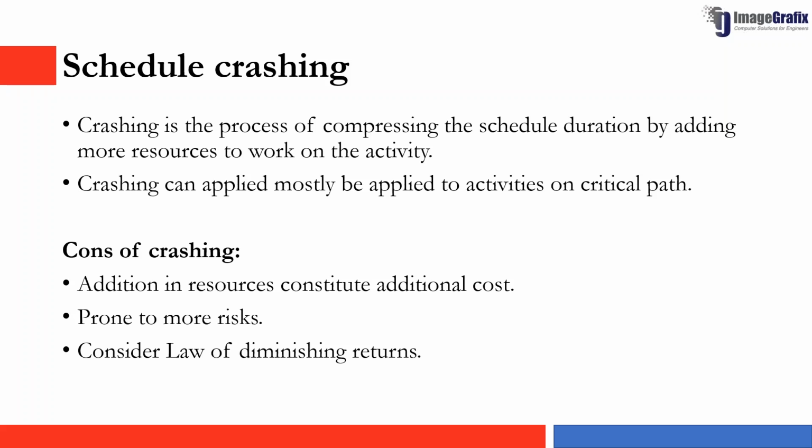So there are some considerations which we need to see when it comes to crashing a schedule. The first one here is adding resources constitutes additional cost. We know that once we are creating the schedule, we will be doing the estimates, and from those estimates we will be having our budgets too. So the budget estimates will be calculated from the top to bottom up estimation, and we will be having a set amount of budget or cost associated to work only for this particular activity alone. So once we are adding the resources, we are going to increase the cost as well. So addition of cost has to be considered here.